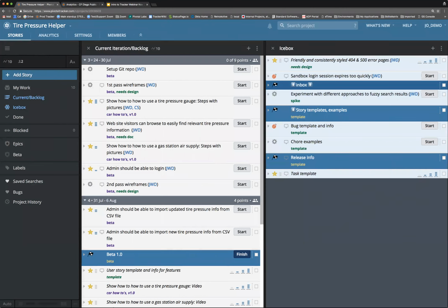So here is to illustrate this idea of Tracker being more of an inbox. I put a release marker in. There are milestone markers, and you can also use them in this way to delineate what's happening. And if people were dropping stories in here, maybe bugs ready to be prioritized, they would all appear at the top of the icebox. And a little marker like this can let the project manager look at those and decide where these would be prioritized in the backlog.